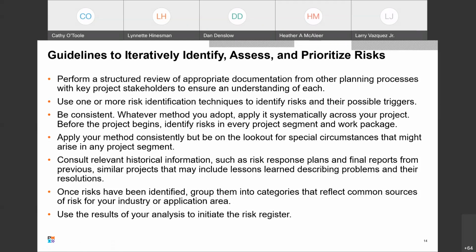So you might want to do it later on when you're in your requirements phase. You'll do it again in your development phase. If any issues come up during development especially, you want to talk about those and look at that list of risks that you created and what your plans are to fix them. And then during your testing, obviously, you want to do it again because you want to make sure that there are no special circumstances like they have listed here that might happen in your project.